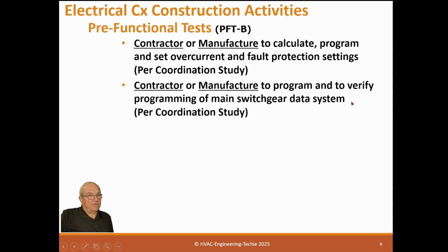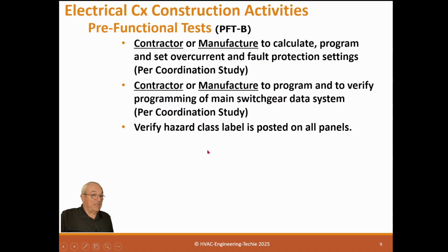Contractor manufactured program and to verify program of main switchgear data systems per the coordination study. Verify hazard class label is posted on all panels. Very, very important that we know what hazard a panel is. Now, remember, the hazard is determined by what the short circuit capacity of the panel is. If it's 10,000 amps, 20,000 amps, 100,000 amps, that determines what the bracing is in the panel and what the